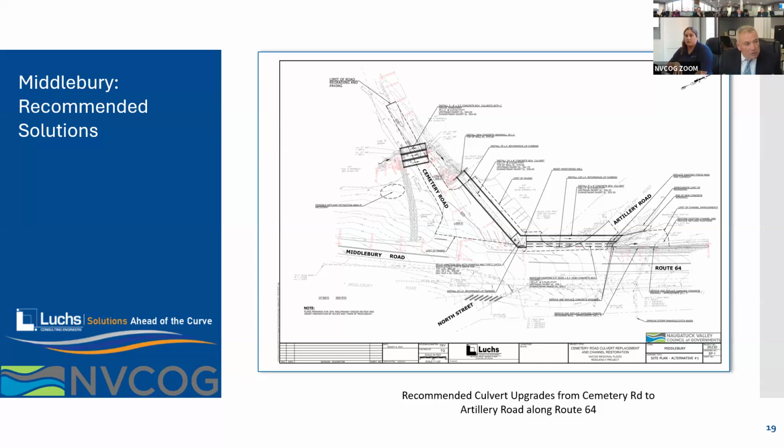Assuming that the town has easements through your property for the drainage system, typically what would happen is that the town would bid a public works project and then implement it. There would be short-term impacts to your property. They would stage it so that they work on half of your parking area, install the culvert, pave that over, then remove and construct the second half.